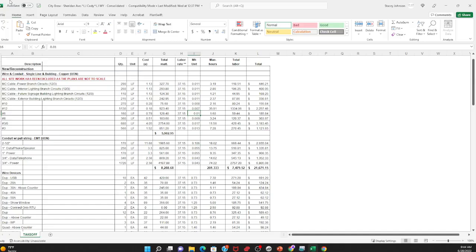Exactly. And in the event that you don't win, you don't have to ask them who won or whatever, because they won't tell you. But just ask them to give you what the winning number was so you can compare it to yours. That's all, if you can do that. And that'll help you a lot.